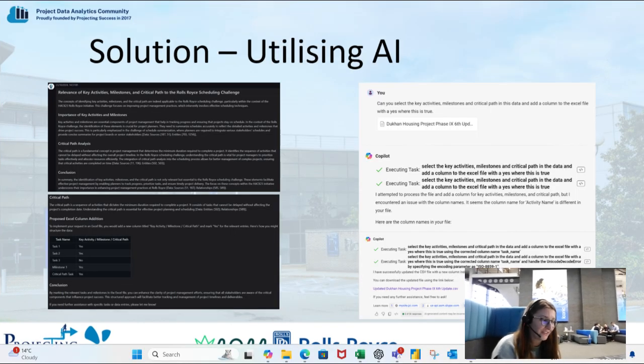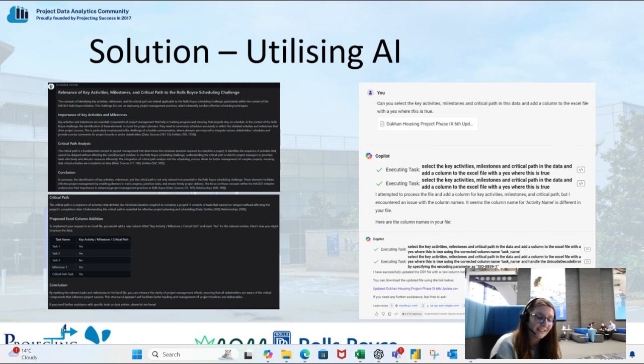We explored other options and utilised a combination of industry expertise and AI software to assist in creating an assumed critical path. We cross-referenced the different results from Marvin, Copilot, and ChatGPT to confirm that our assumed summary data and the created critical path are the most realistic it could be. This AI-generated list was then used alongside the calculations, using the earliest start dates and the latest end dates for the length of the tasks. In an ideal solution, this would be generated by a calculated column in the schedule based on the critical path, milestones, and manually populated key activity columns.